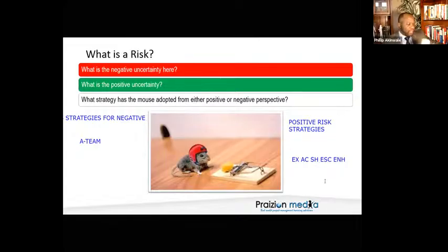Okay. Here's another example. Phil encounters a risk on his project. As a way of dealing with the risk, he sends his team members for training to reduce the possibility of them doing something wrong. What strategy is that? Thank you, Maribel and Cadian and Willanda. Thank you very much. So if Phil says, I'm sending you for training to reduce the possibility of you goofing, that is mitigate. All right.